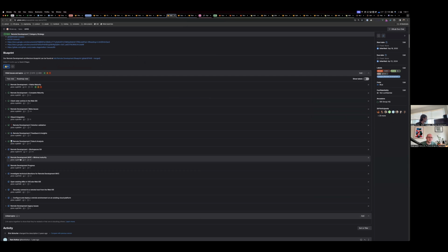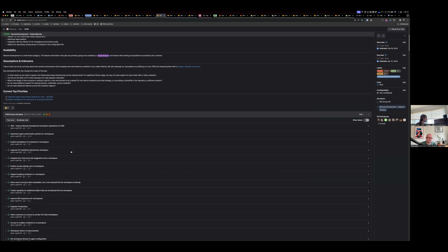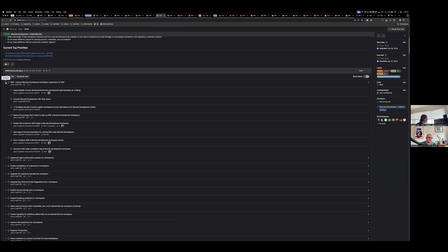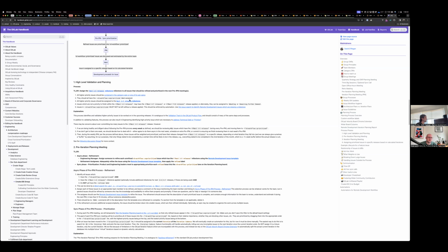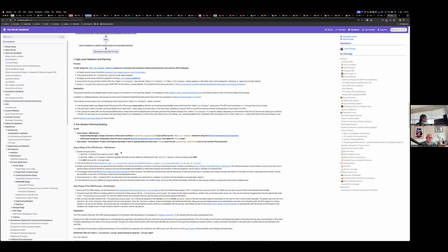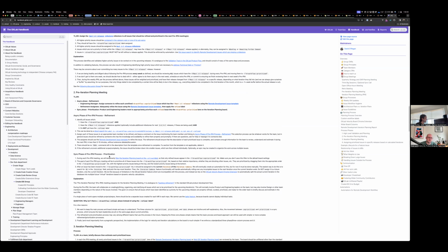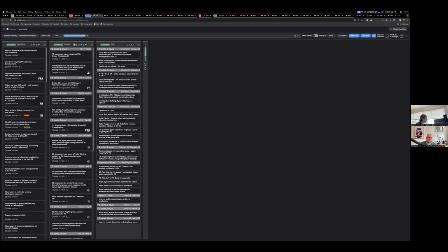We've already done minimal, beta, GA, now we're on viable. And the EM and the PM and the high level planning mostly just focuses around this. Like, what do we need to do next? Anything that does for the process gets assigned the next 1 to 3 releases. It gets kicked out for refinement, assigned to engineers. And then after it's refined, it gets prioritized into the board here.